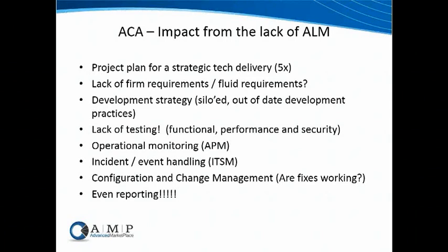Development strategy also came up, with these different vendors really just doing their own thing in a siloed fashion, right? Integrated testing didn't start until 2 weeks before the go live date. We have to wonder if there was a lack of communication between the teams that were involved, or if that could have been sped up through some form of collaboration.